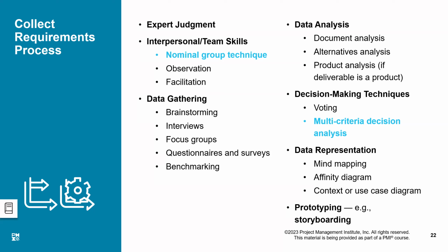Yes, we have done it. So what we do is we add up the weightages, that is 1 for the first option, 3 for the other option, 1 for the other option, that will come out to be 5. Then I'll sum it all up and divide it by 5, right? Unlike an average where we always divide it by 3. So whatever the weightages you have given, add them all up, and based on that, you do the multi-criteria decision analysis or weighted averages. Anyways, if it is getting more complicated, we can discuss it later.